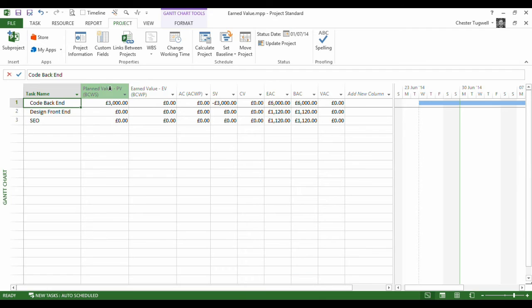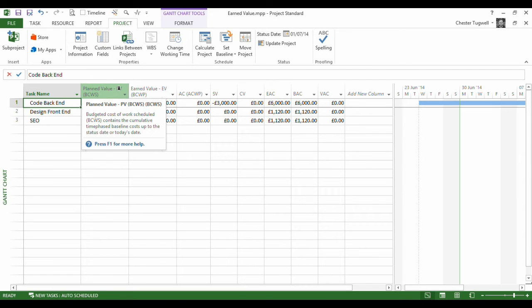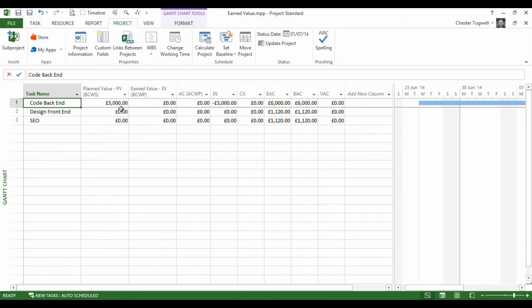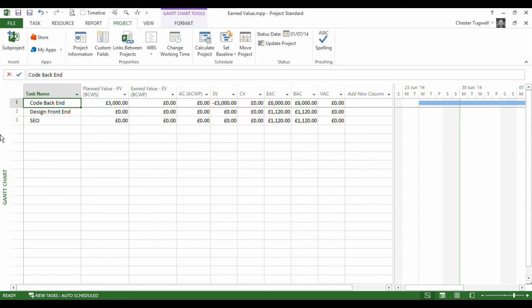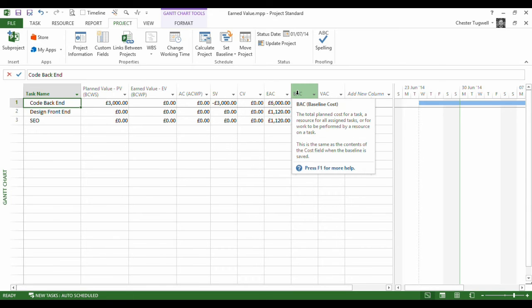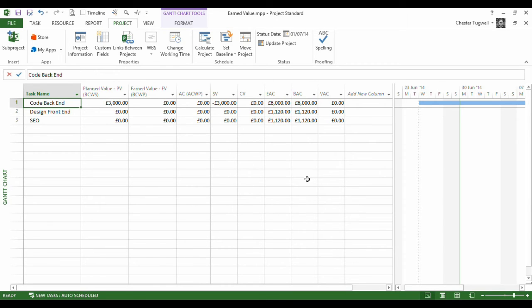Now, just looking at this table, we can see that our planned value field tells us that if we were halfway through the task, which we said on the status date we are, we should have spent £3,000, which is half of the baseline figure which we can see here.